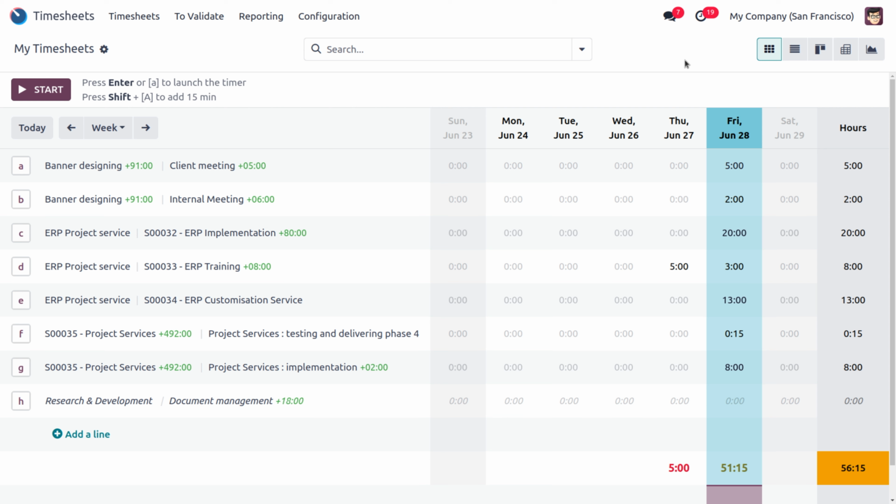In some cases, the employee may have performed 10 or 20 hours, but only a few hours will be productive. Suppose 10 hours has been worked, out of it, 7 hours is productive, and the remaining 3 hours will be for internal discussion or any other internal work. It should not be invoiced to the customer.